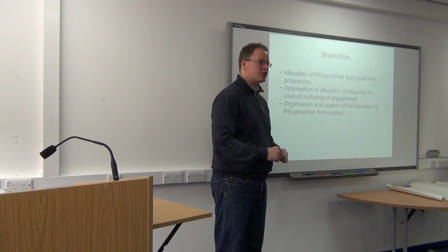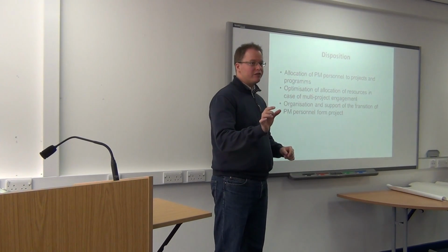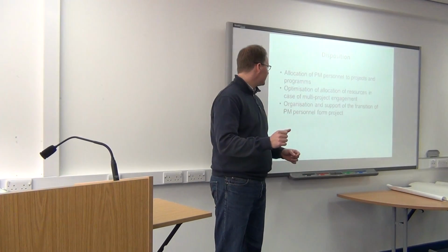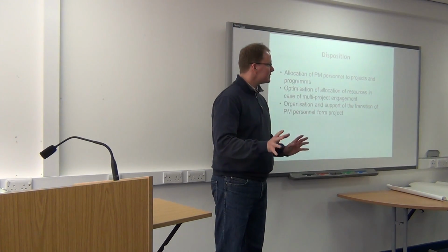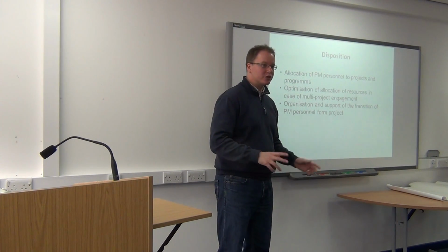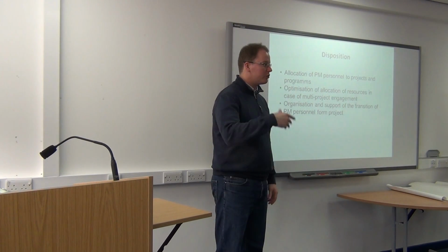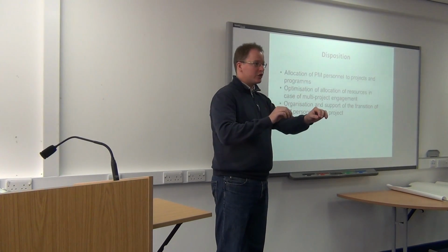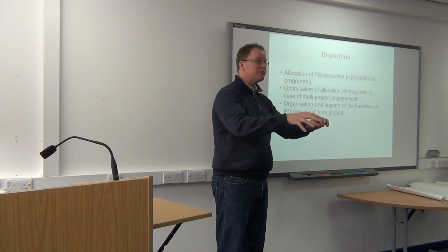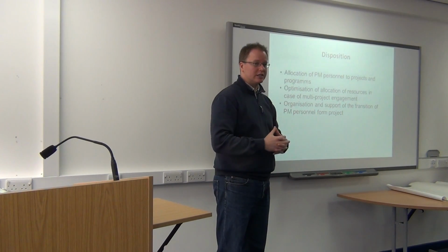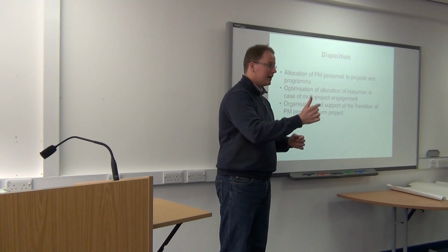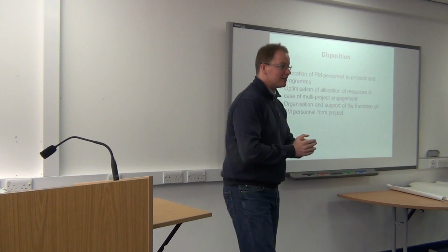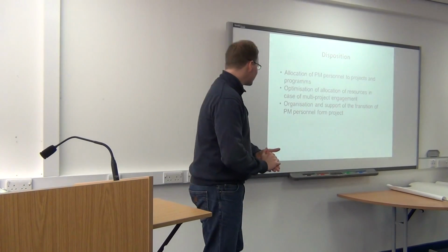I've seen that in a few organizations that have team members that just come in for certain activities on the project. A very famous one is, we are in the defense sector here, for Typhoon, for close out. If you build a big plane that you're commercializing to different countries, then they have a closeout team. So they remove the project manager and certain project team members and just bring them in because they're very good at this. Making the closeout deal and actually bringing the product over and making that final handover, or commissioning them for a big manufacturing contract. This is potentially what you're after then.